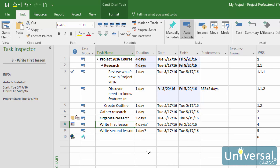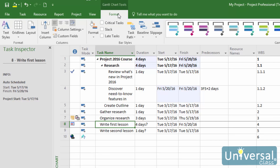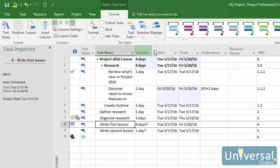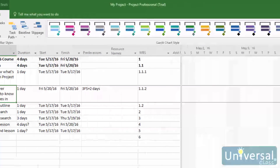To see your task paths, go to the Gantt chart view if you're not already there. Go to the Format tab, then click the downward arrow on the Task Path button. Select the task path you want to see from the drop-down menu — we're going to choose Predecessors. In this case there are none, so let's select a task that has a predecessor. You can see the predecessor task has been highlighted in yellow.